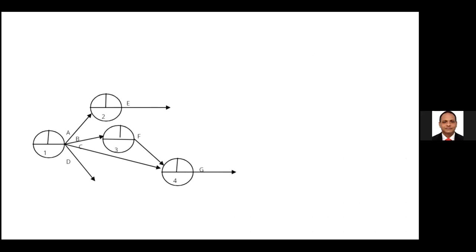Now you see that H and I both require G, right? If you complete D and G using another event, it is a problem to draw I because we should complete EG. Therefore, G is common for both H and I, so you need to complete G separately. That's the correct way to draw this. If you connect GD or GE, it's a wrong interpretation. Much better to complete G separately.